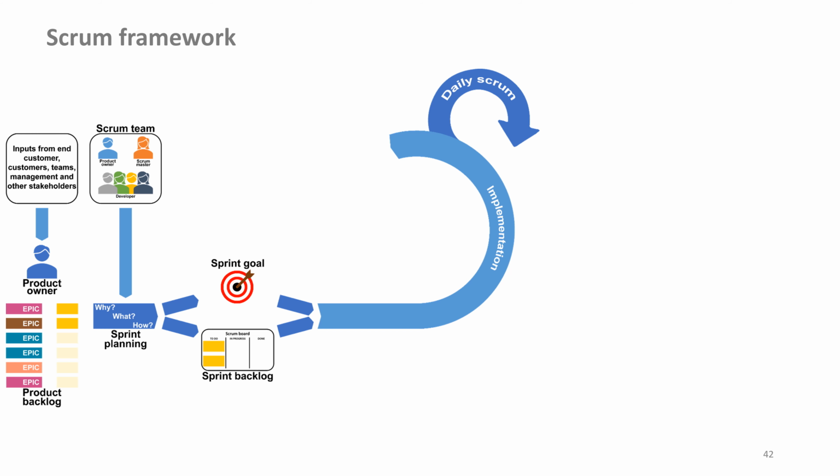During sprint planning, the abstract and overall sprint goal is defined. If this sprint goal is endangered because it no longer makes sense, then the sprint should be terminated. In other words, the product owner stops the sprint. A retrospective is done to prevent this from happening again. Then a new sprint planning is done. A new sprint goal is defined to go into the next sprint.